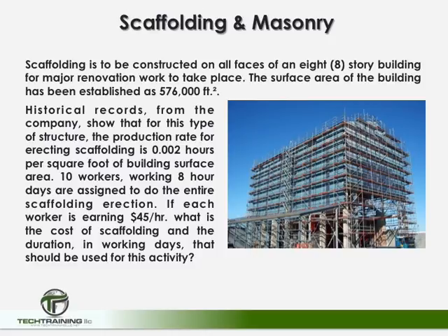10 workers working 8-hour days are assigned to the entire scaffolding project. If each worker is earning $45 an hour, what is going to be the cost of the scaffolding project, and how many working days should be assigned to this activity? If you want to pause the video and try to do your own calculations, feel free, and we're going to show you the solution on the next couple of slides.